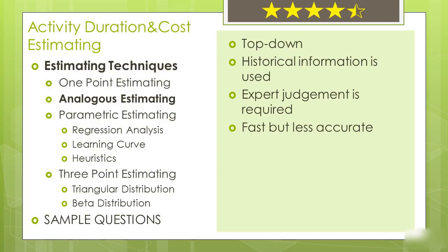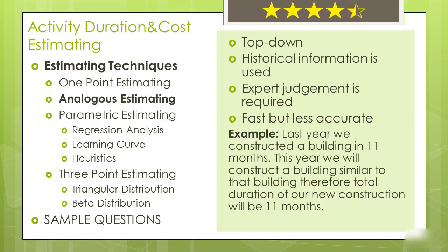Let's give an example in order to better understand. Last year, we constructed a building in 11 months. This year, in another city, we will construct a building similar to that building. Therefore, total duration of our new construction will be 11 months.